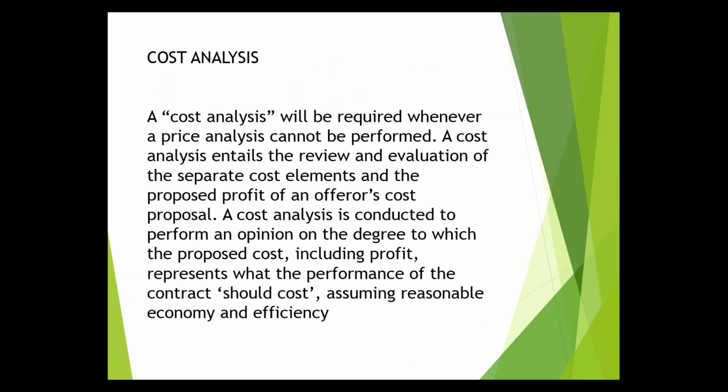A cost analysis, on the other hand, is required whenever a price analysis can't be performed. A cost analysis entails the review and evaluation of separate cost elements and the proposed profit of an offeror's cost proposal. Cost analysis is very difficult, and we definitely want to avoid this to the extent possible. They're very difficult to do.